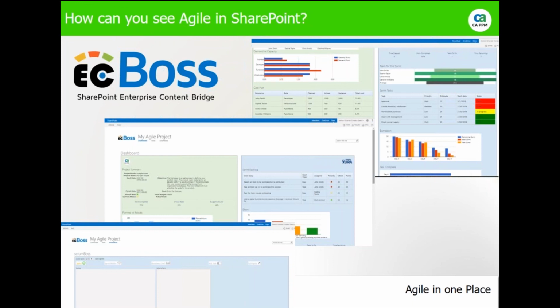So actual cost versus budget. Both traditional and agile projects have capital and operational expenses that are tracked. Actual cost versus budget cost should be reported regardless of project methodology. However, it is not appropriate to ask an agile team to track time at a task level to calculate resource costs. Instead, resources should be dedicated to an agile team and costs calculated accordingly.